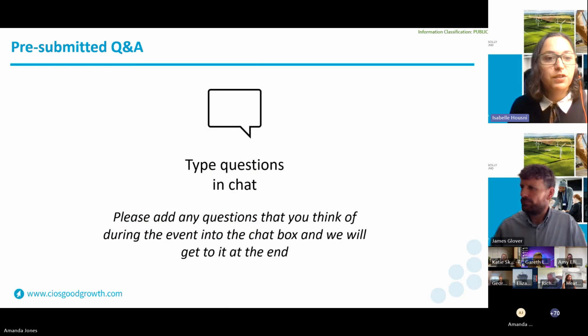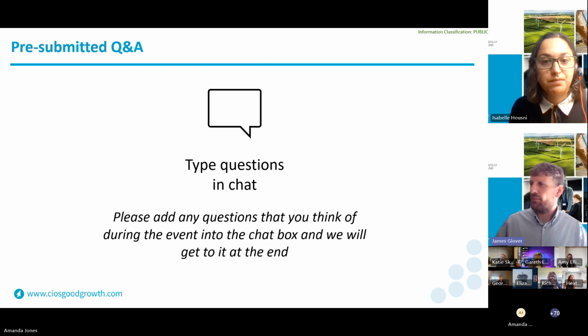So question 12, we need to be sure that we can pay our contractors promptly enough that the project does not get held up. What will the delay be between submitting a claim and receiving our next advance payment be? Yeah, the advance payment will be released once we've approved the claim and the spend is in line with Shared Prosperity Fund requirements, i.e. the previous advance is fully defrayed at the intervention rate. Details of these advance payments are set out in your grant funding agreement and any advance agreement. Should you wish to change the payment schedule, you need to liaise with your project lead to formally request and get in writing a change to expected payments to contractors.